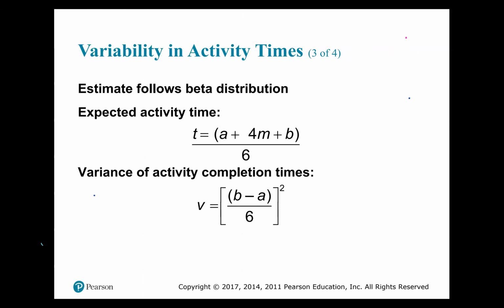We normally talk about the normal distribution, but in project management, the statistical distribution that proxies the time variations is called the beta distribution. But we are going to find that the beta distribution looks very much like the normal distribution. So we end up using the information from the normal distribution, right? Just a little bit of statistics and just a little bit of knowing that that is what. So you don't have to worry yourself too much there.